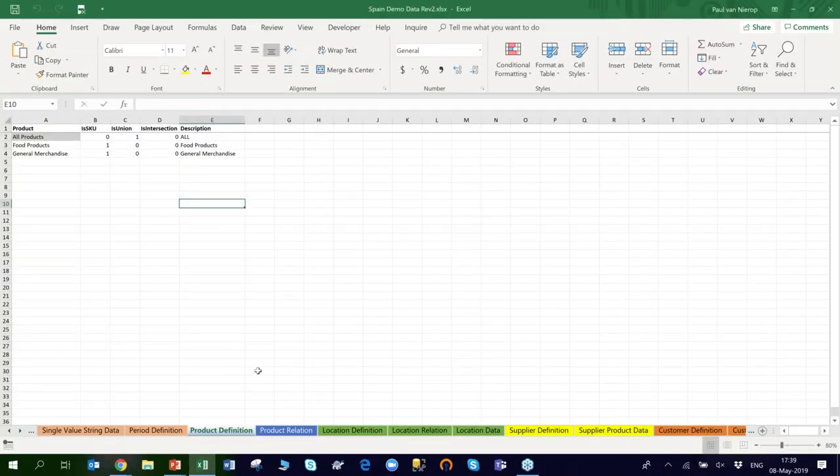I'd like to turn to the other major barrier, and that's data. So, as Brian says, often this can be a perception. And when you start this project, often a trap is to say, well, I need an end-to-end encyclopedia full of data before I can start. And you launch a six-month IT project before you've even seen your first screen. So we take a very different view on that, and it's an approach that says start with what you've got and start quickly so that you can start seeing the screens and getting the insights. And then as you go, you'll figure out where you need to sharpen the pencil and what data you need.